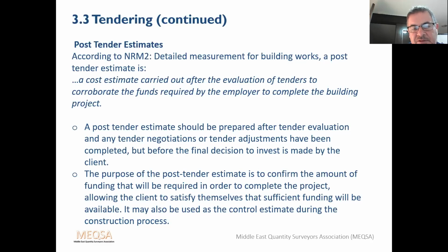The purpose of the post-tender estimate is to confirm the amount of funding that will be required in order to complete the project, allowing the client to satisfy themselves that sufficient funding will be available. It may also be used as a control estimate during the construction process. I may say at the moment these post-tender estimates are quite rare.